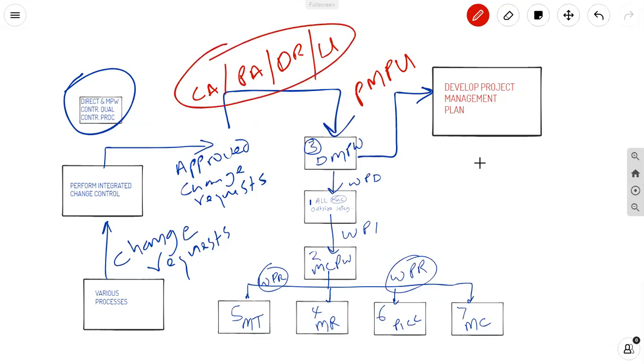So, if you get an approved change request, it needs to be worked. Think about it as being worked into planning from the direct and manage project work process. From there, you will get these project management plan updates, and they come from a number of processes. But because integration is what it is, I want you to think about them being integrated in a central place, as they have attempted to show you on page 27.